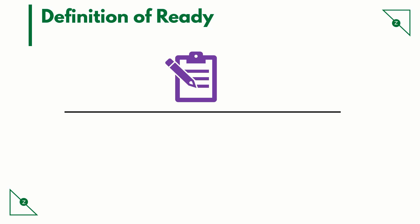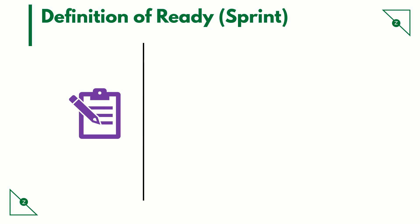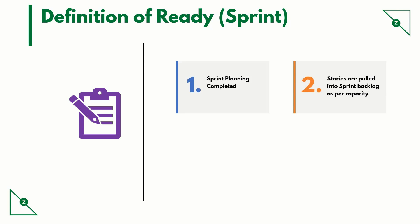Definition of ready can be defined for the following, but not limited to them: sprint, story, and release. Here are some example pointers for definition of ready for a sprint. The sprint planning has been completed. Stories are pulled into the sprint backlog as per capacity. Stories have tasks created under them with original estimate, and the original estimates are typically in hours.